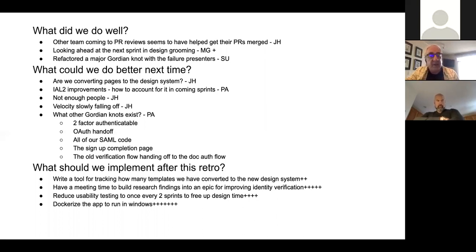And then you can see the pluses at the end of these, where at the end of the meeting, the team voted, and they'll pick the top 2 to implement. Those 2 will show up in the top, how are our changes doing? The Scrum Master will try to make sure that they actually get implemented in the upcoming sprint. And so that, go ahead.